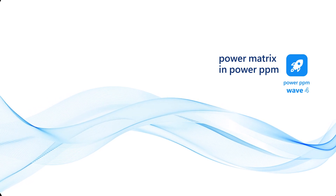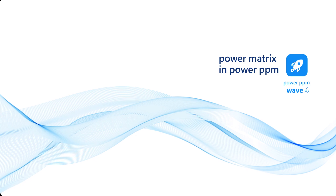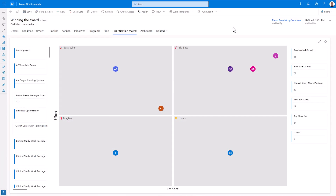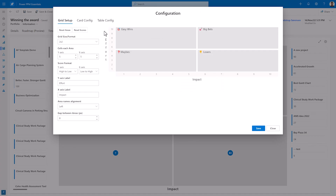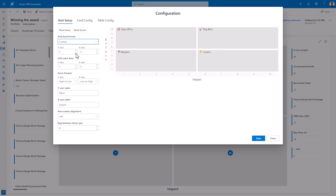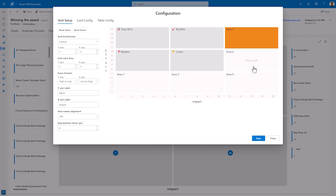Welcome to the introduction of the Power PPM Power Matrix. As part of Wave 4, we are introducing the Power Matrix, an easy way to visualize which initiatives to select based on a 2x2 matrix — in this instance, impact and effort. On the left, it is possible to drag and drop projects into the grid. Automatically, a score is calculated and the initiatives are ranked on the right side. The Power Matrix is easy to configure, supporting 2x2, 3x3, or even custom numbers. You can quickly visualize what the final result will look like.